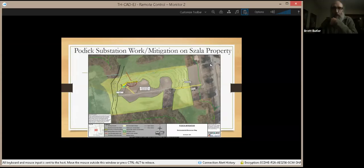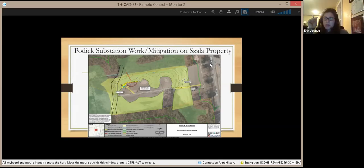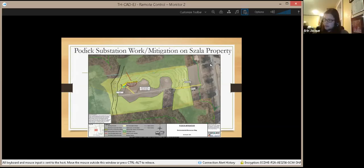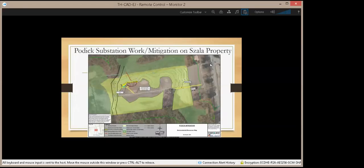Okay. But I don't think they can do it right now. They have a specific period when they can do it and when they can't, just for the beaver trapping things like that. And I think we might be out of that season. Okay. The dam removal does include the trapping of the beavers, right, Melissa? Yes. I think you have to, or they're just going to come right back. Right. I mean, they might actually come back anyways, but this will at least give you some time. Right. Yeah, I believe it's Integrated Wildlife Services.